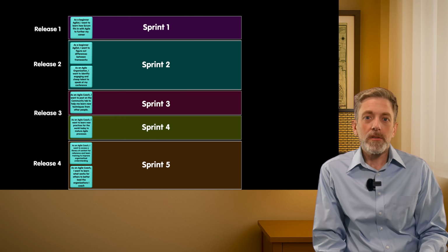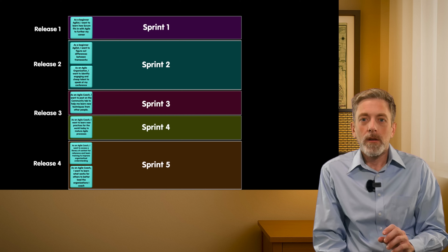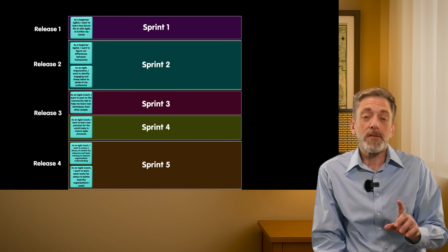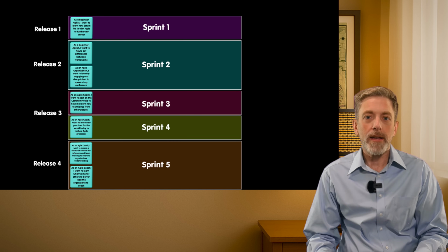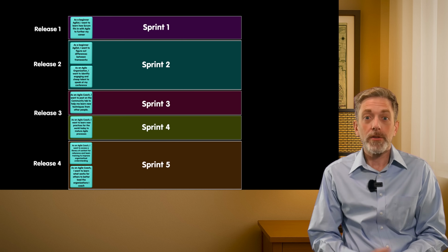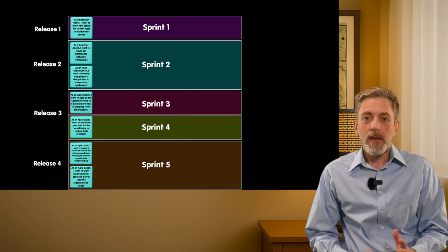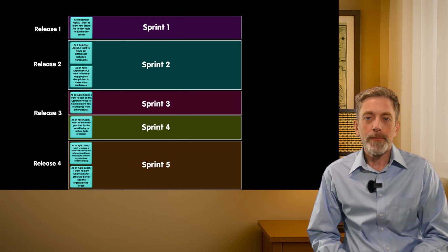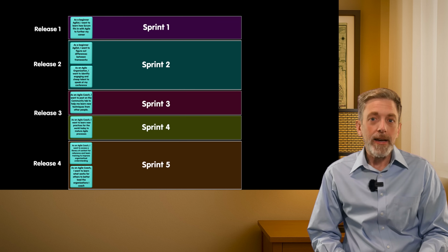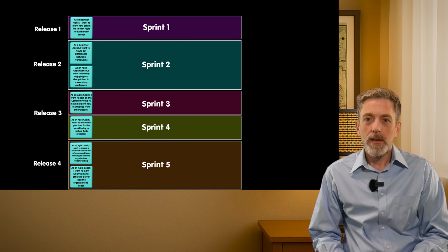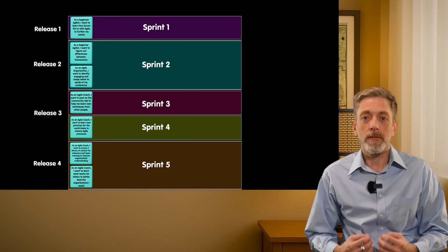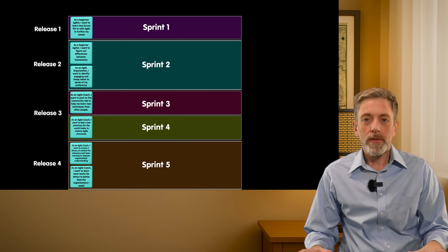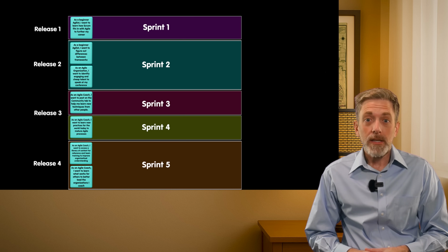I've kept the release labels and I've added sprints. You can see how release 3 will take 2 sprints, and this has to do with my capacity, how much work I can get done in a sprint. During sprint 3, I have other engagements and I can't spend very much time on my video. So I will enable the community tab. Anyone who stumbles on it can see it. However, since I haven't made the video announcing it, I don't consider the release complete. That's part of my definition of done for a release. All things must be done and announced in a video.